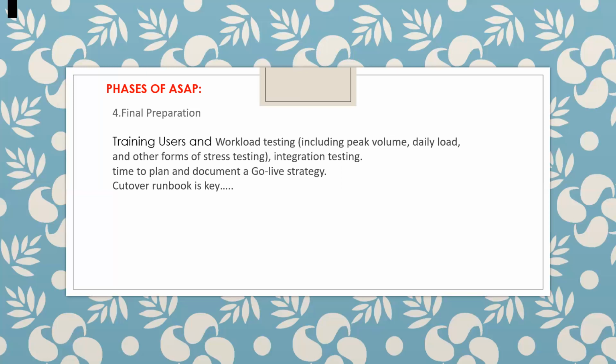You have something called a cutover run book. So what is a cutover run book? Your cutover run book will discuss what all the configuration that needs to be done in the particular system, whether the configuration is client independent or dependent, how many maintenance tables are there, how many configurable tables are there. And what are all the third party systems we are going to integrate with SAP. A lot of journey with the cutover book.